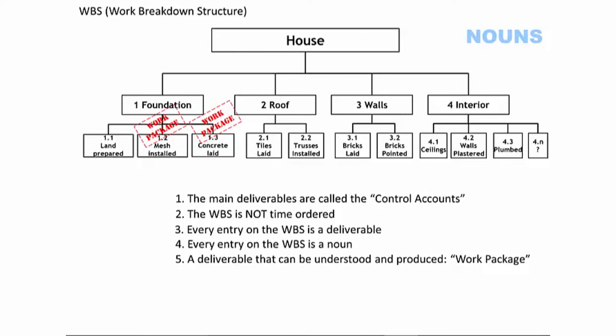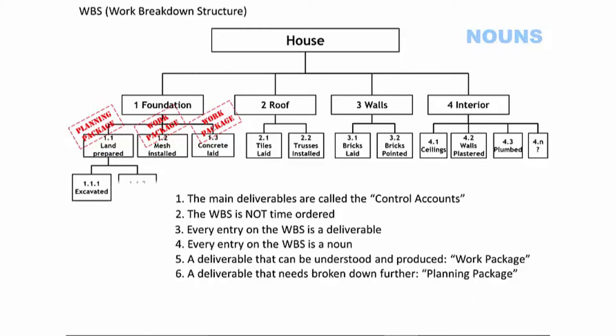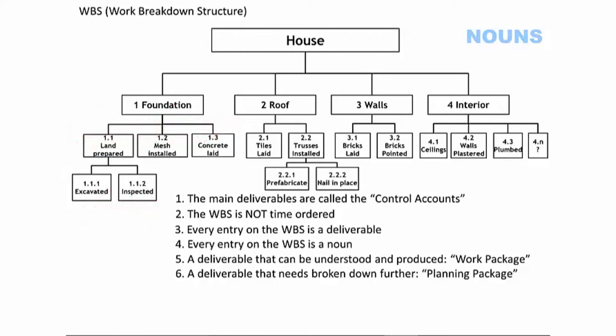A sub-deliverable that needs to be decomposed further is called a planning package. So 'land prepared' is a planning package. We decompose it further until we arrive at work packages, and then we don't need to do any more on that control account. The numbering system has two purposes: firstly, it helps you navigate the breakdown structure. For example, work package 4.3.2.1 tells you immediately it is part of the interior, part of the plumbing, and the first work package in the second planning package.